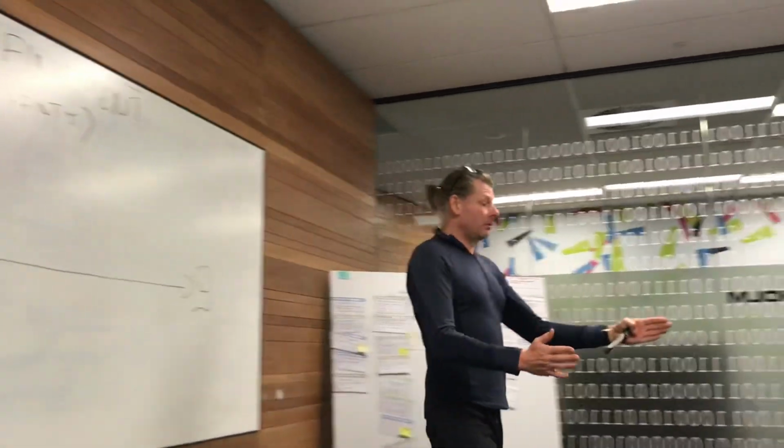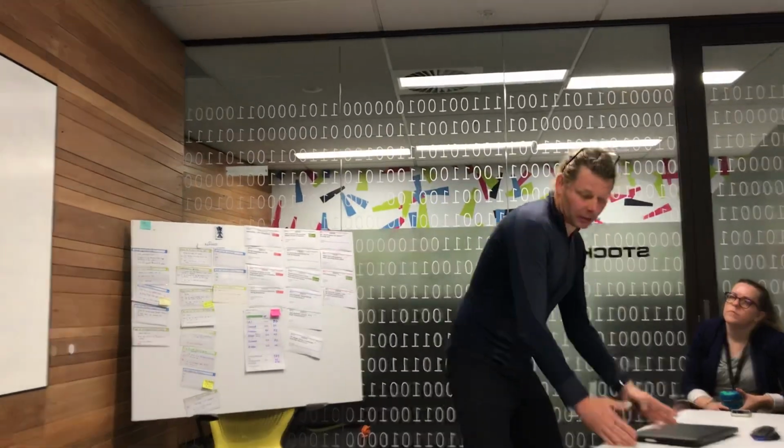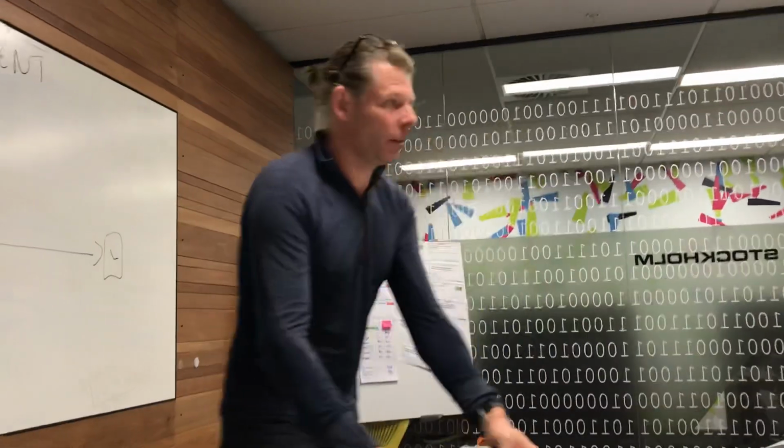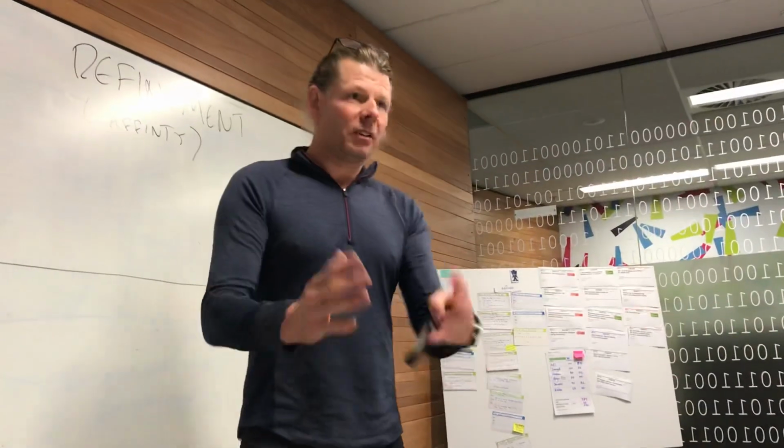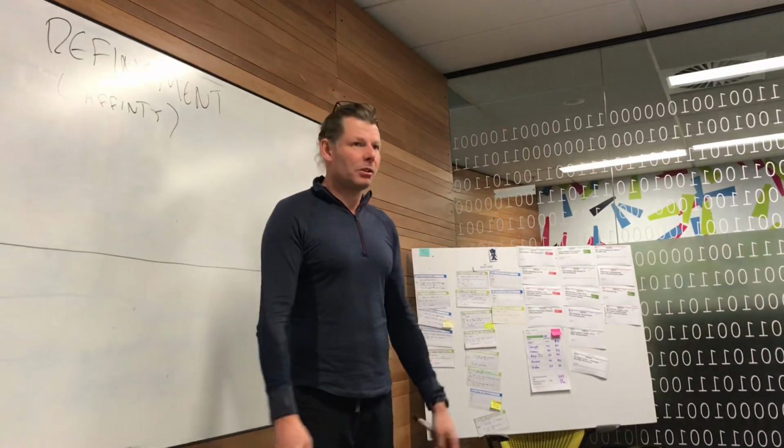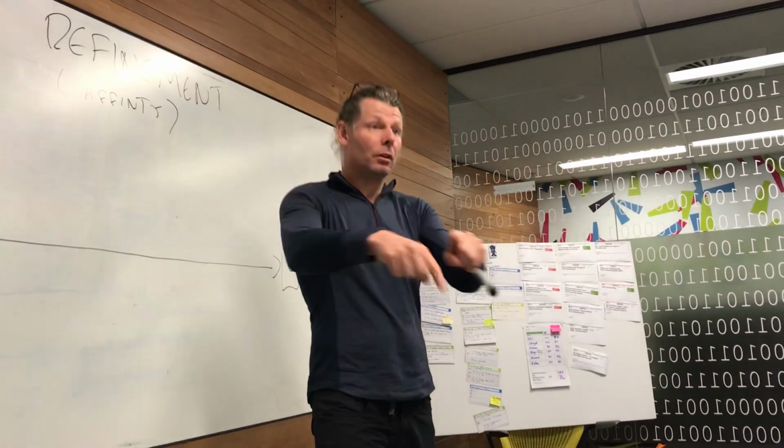Obviously, if we get to a point where you keep swapping like that, then we'll stop and we'll discuss it. We will then be able to create the boundaries. All of these are 1s, these are 2s, these are 3s, 5s, 8s, 13s, 20s. Group them together. Thank you very much, job done. Because then you just add them all up.